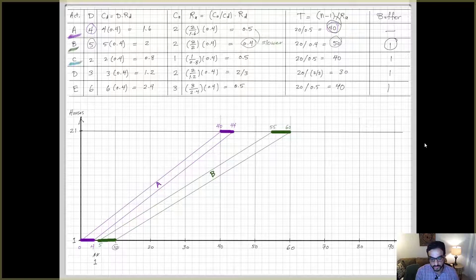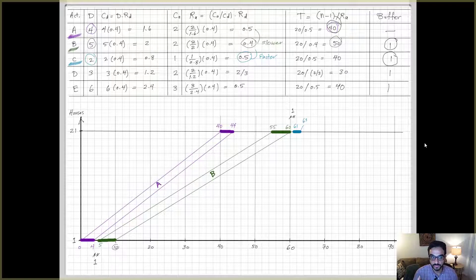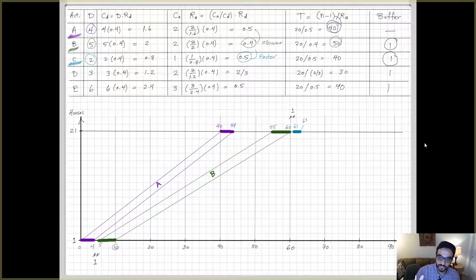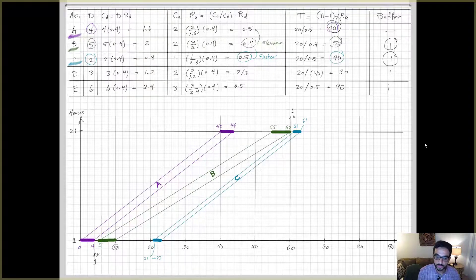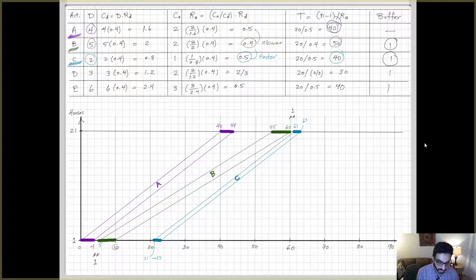So far, so good. I've done two activities. The next one, following a similar process, but now I see that I'm dealing with C relative to B is faster. So now it's 0.5 compared to 0.4. Faster means it's a steeper slope. So Tetris, imagine this C activity is moving from right to left, it will hit at the top. I have to draw it from the top, draw the activity at the last unit, and I have one day buffer. Activity B ends at 60, so activity C will start at 61 and adding a duration of 2, 63. Now I'll draw this activity backward to find where this activity starts at the first unit. Considering it has a T of 40, so 61 minus 40 will be 21, and this activity at the first unit will end at 23. Draw the two parallel lines here for C, I have C in the line of balance.